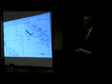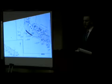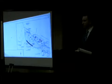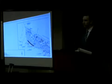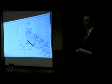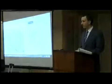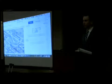So they would like to phase it, doing one or two driveways at a time, bring them to a binder grade at a minimum to restore those, allow their residents to return and safely use those areas, and then move on. And that would be the intent in these driveways that are in the resource areas as well. So I spelled out a sample phasing plan. This will be confirmed at a pre-construction meeting and once the contractor is on board.